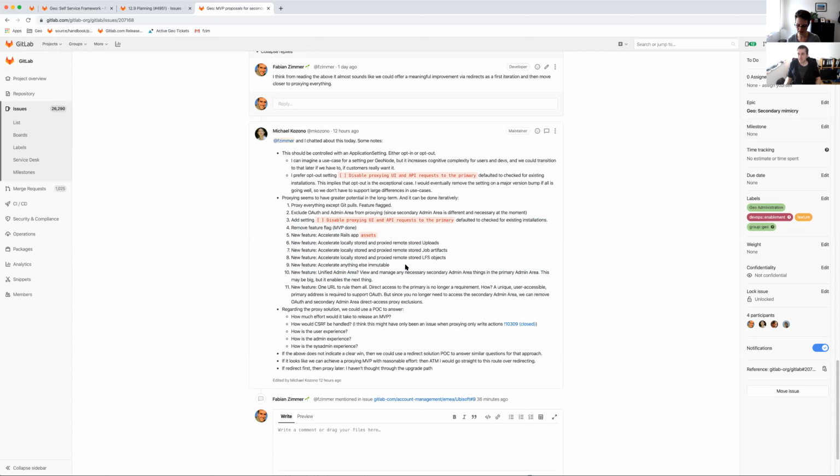Well, that's it. And I think that's a really challenging piece for yourself: what is the most impactful thing that we can do, because it's all about wading through the list of stuff and figuring out what the most important thing is to do first. And it's true. Yeah. And I think the good news is, because we have a Kanban-like process, depending on what we determine is most important for a given month, and a month is probably the planning horizon for a concrete action, we can swap around things pretty quickly if we really need to.